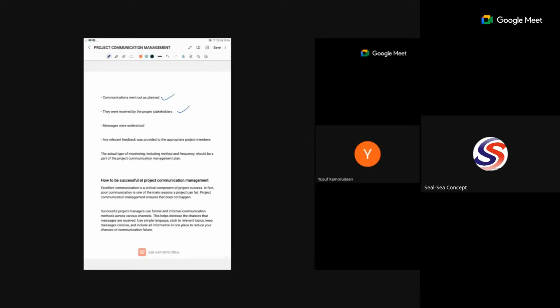I still saw some of it today, where people will be saying, oh, I received the certification. It's just an acknowledgement, a form of acknowledgement. As a stakeholder, you may also decide during your communication planning if you will be needing acknowledgement of any report being sent. Perhaps you are sending some reports via email or anything. If you would need acknowledgement from stakeholders or anyone that may receive your information, you need to have it stated and discussed and agreed on.